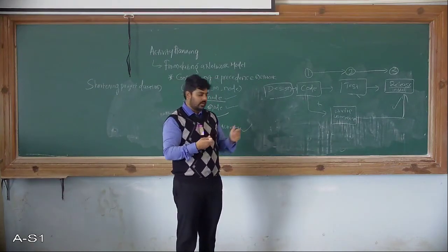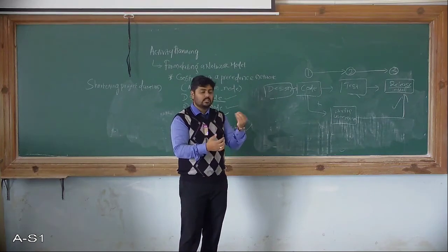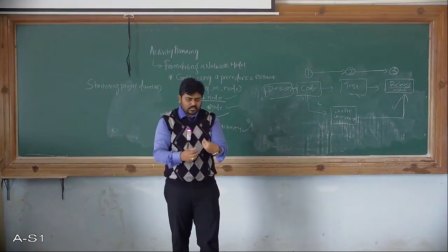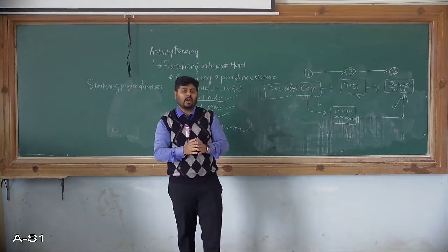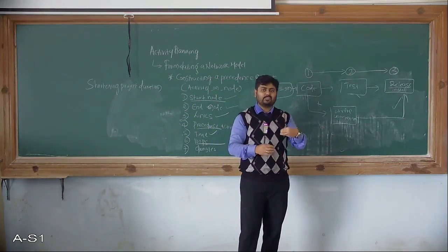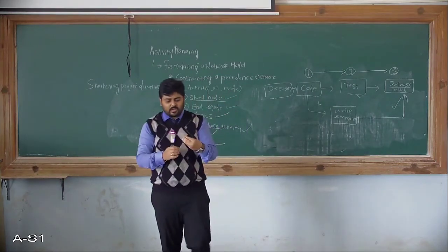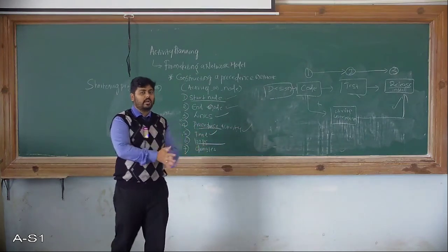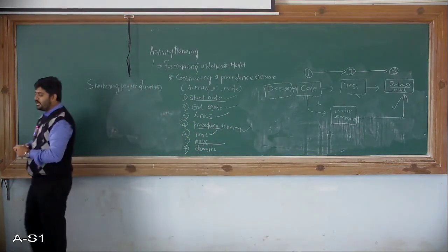You may come across a total float of 6 hours or 6 days or something. So instead of starting on the first day, if you start on the 6th day, there won't be any alteration in the total project duration. That is the activity involved in the non-critical path. In that case, you can share the resources with the critical activity so that they can complete their task in the given duration or time.